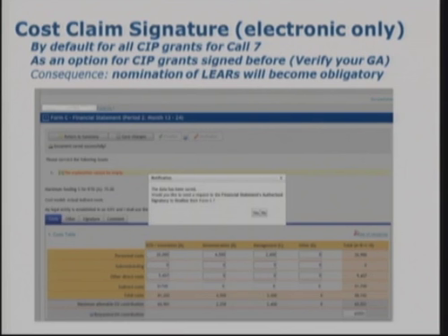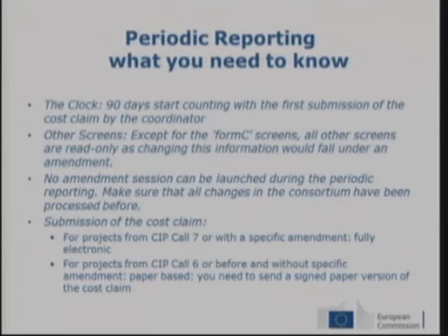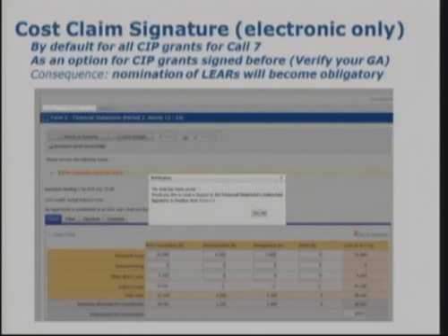No amendment session, as I was saying before, can be launched during the periodic reporting session. So be sure that all the changes in the consortium have been processed before, because otherwise you cannot be amending that during the periodic reporting phase.